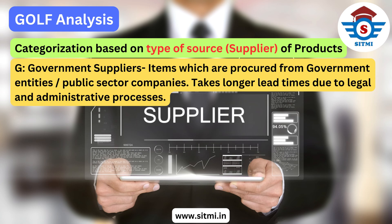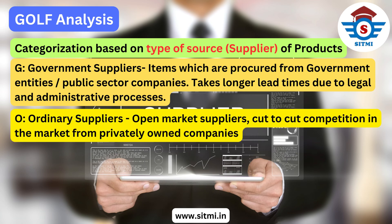The second source is O, which stands for ordinary suppliers. Ordinary suppliers are basically open market suppliers — non-government suppliers — and there is cut-throat competition in the market from privately owned companies. Materials sourced from ordinary suppliers usually have lesser lead times due to the easy availability of products from multiple sources.